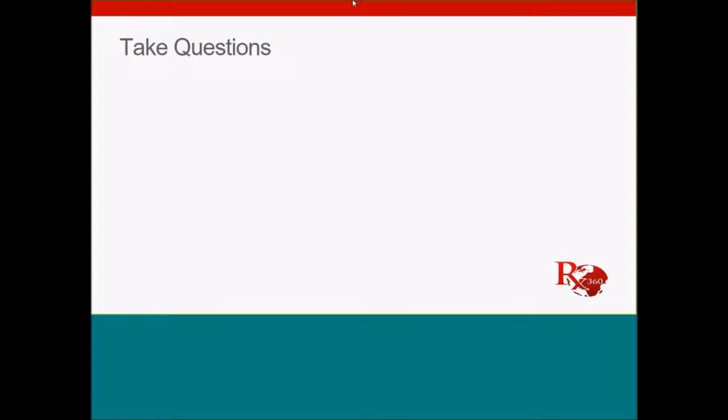Thank you. Can you repeat the answer to the Rx-360 stance when suppliers do not respond to CAPAs? So the process for CAPA responses is that BSI does reach out to the supplier in order to obtain a response on the CAPAs. They work with the suppliers in order to get a response. If the supplier is non-responsive, then BSI does reach back out to the sponsors of that audit, the member companies, and asks them to intervene and reach out directly to the suppliers in order to secure a response. So you would then follow your own corporate policies for obtaining a corrective action plan from a supplier when the supplier is non-responsive.